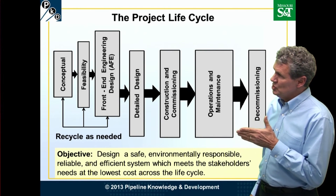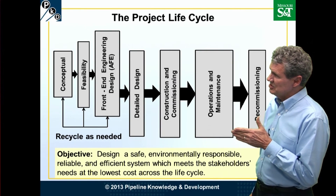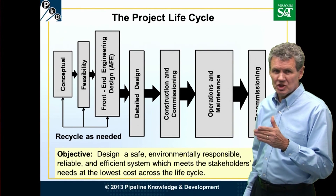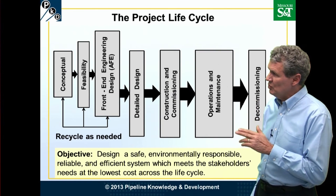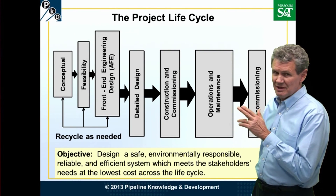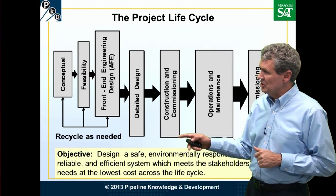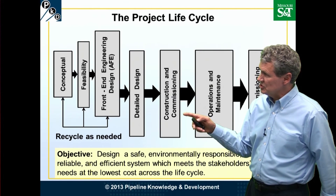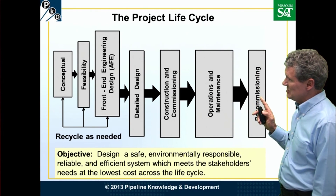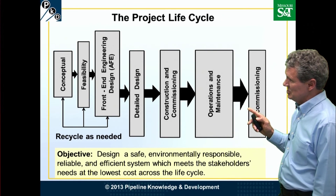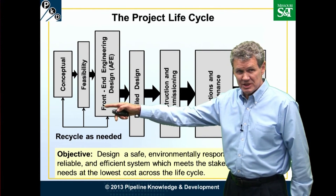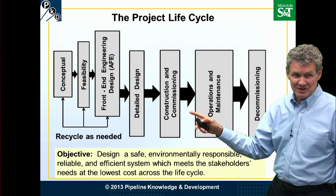Whenever you move from front-end engineering and design into detailed design, there are no more recycle arrows, because we don't want recirculation at this point. We want to have nailed down the design so we can construct and commission it, operate and maintain it, and finally perhaps decommission it. Recycling is needed in the first steps, not once you get into this area.